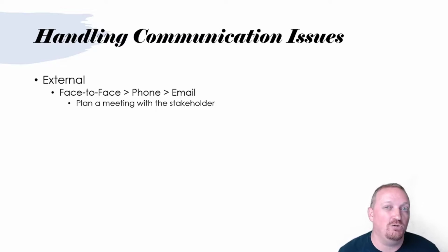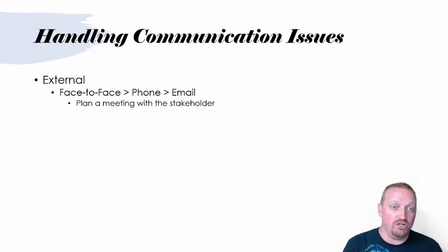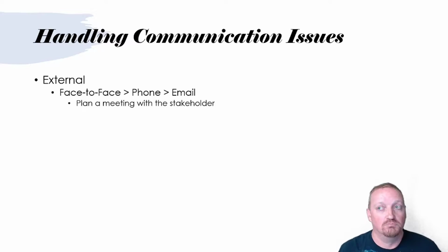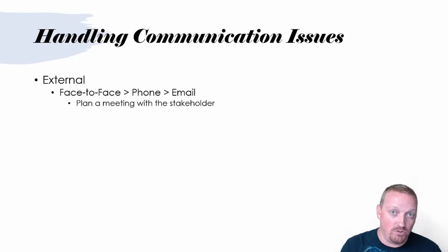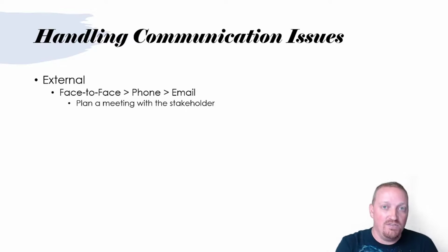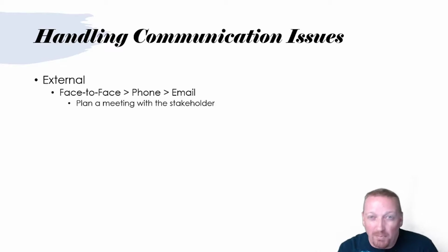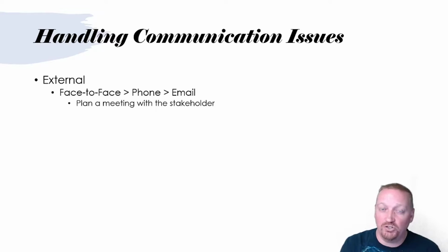But once you have 2, that really becomes problematic, and it makes it very difficult, because now let's take the idea that you have a user story that has unknowns and communication issues on it. Should you be trying to do that in this current iteration? Probably not, because that means you have a spike to plan to go learn through, and you have to set up a meeting with somebody. Are you going to be able to get all of that done and the work that's necessary done in this one iteration? Probably not, right? That's really not good planning.